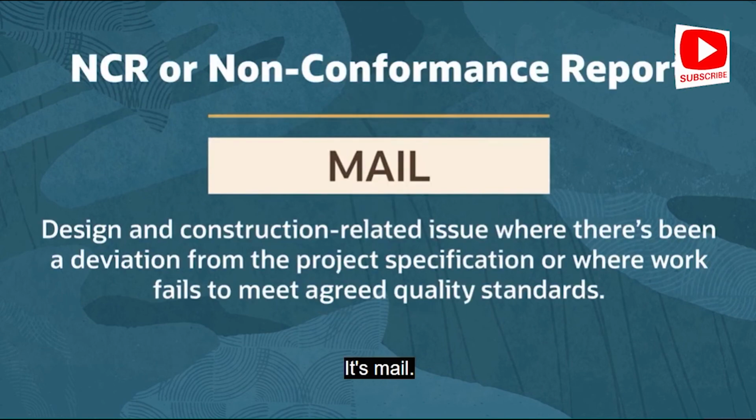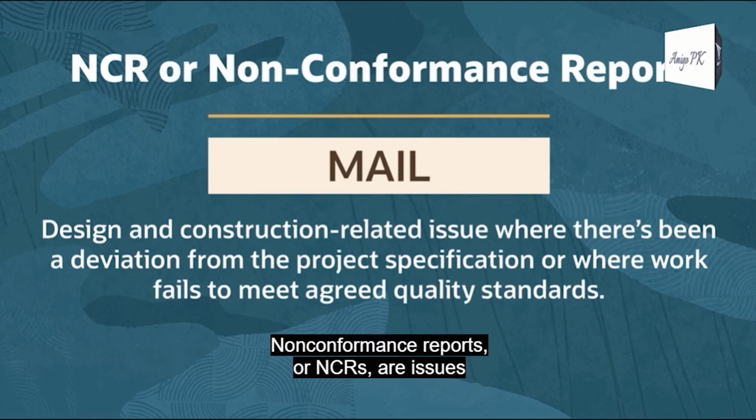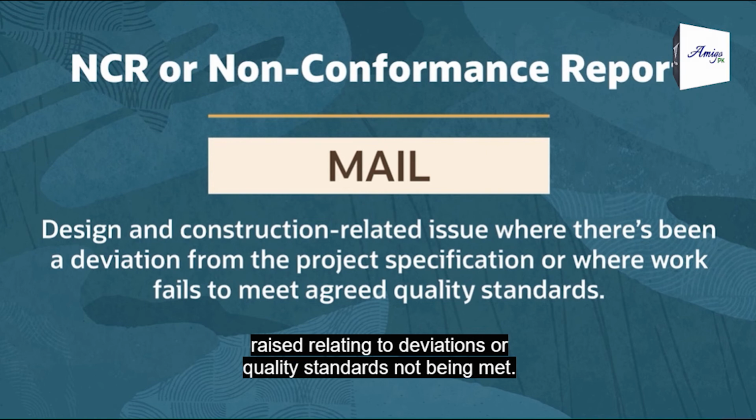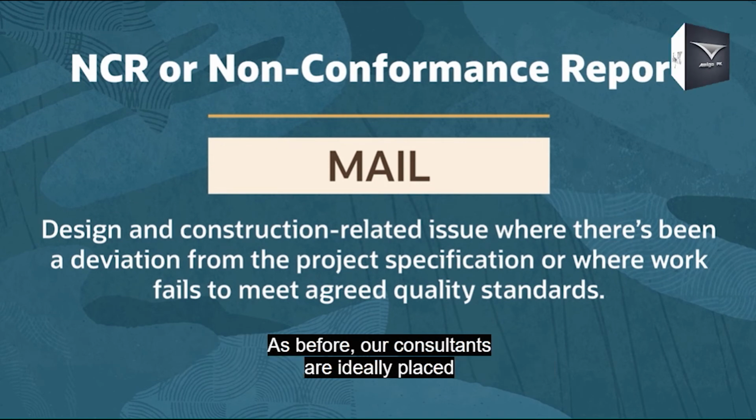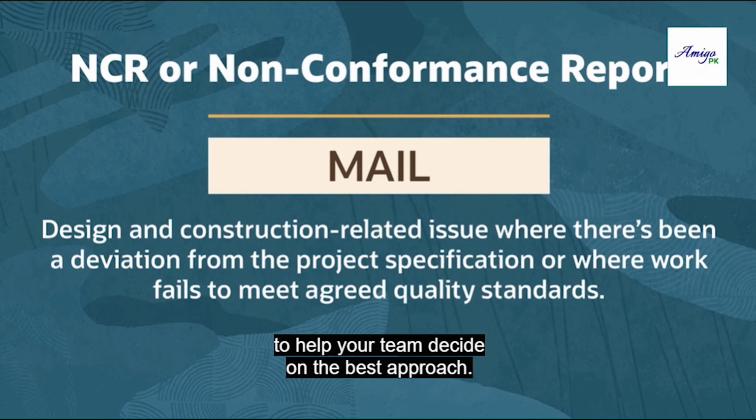It's mail. Non-conformance reports, or NCRs, are issues raised relating to deviations or quality standards not being met. Now, this is another one where teams do sometimes choose documents over mail. As before, our consultants are ideally placed to help your team decide on the best approach.